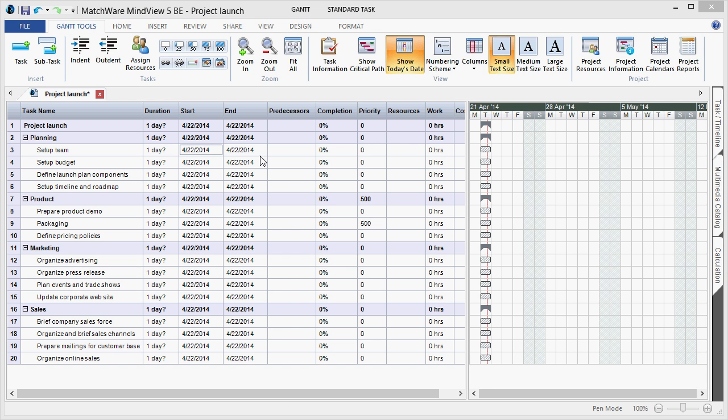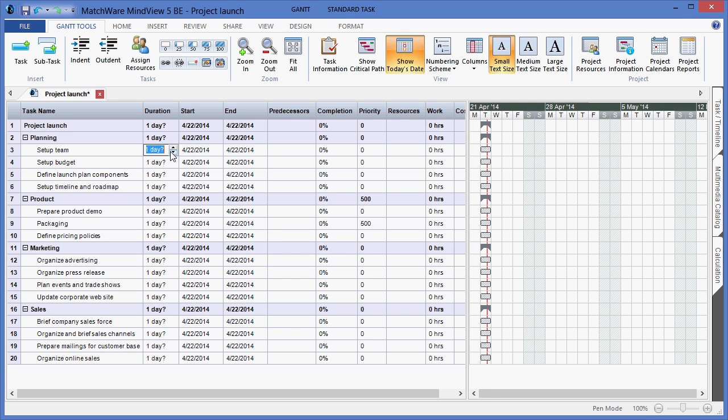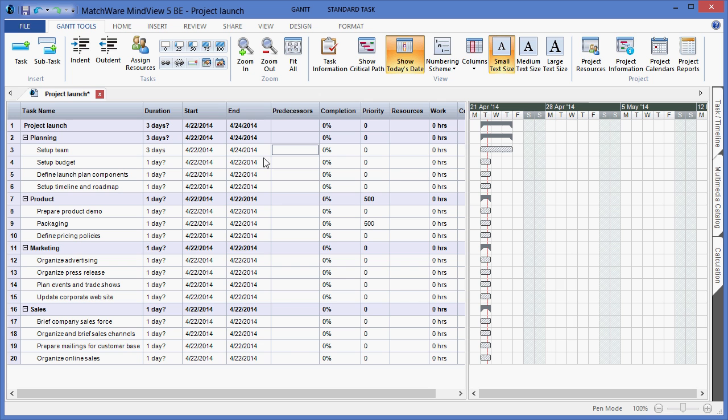In order to alter the end date of a task, I would update the duration. As you can see by increasing it to two days or three days, the corresponding end date of that task is adjusted.